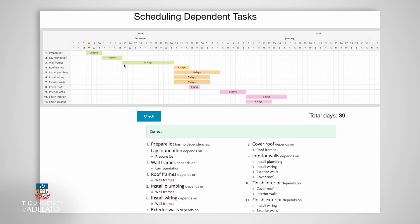We knew that the first three activities would remain unchanged because they were dependent on a previous activity before they could be undertaken. However, if we take a closer look at the next four activities — activity number four, installing roof frames; number five, plumbing; number six, wiring; and number seven, assembling the external walls — they are activities that can likely be done simultaneously, since none of those activities are dependent on the completion of another activity immediately before it.